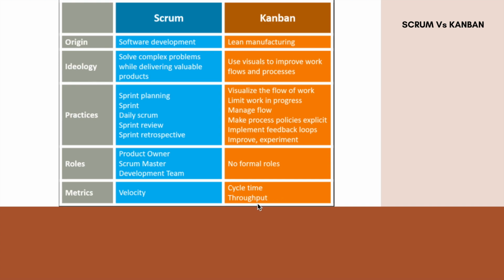Now, where is Scrum applicable practically, or Kanban applicable practically? Scrum can be more focused on development tasks, with respect to development and QA teams and other teams. Kanban you can mostly relate with the DevOps team, because in a DevOps team we cannot follow Scrum properly. It's not just tickets where the DevOps team or SRE team or other teams have the focus where they are doing only development work. There may be some maintenance issue, some production issue which comes ad hoc, and they need to work on that.